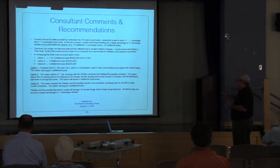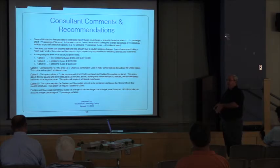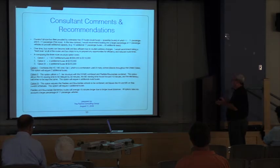That would be the perfect time to really try to take advantage of any of that we can. We talked a little bit before in comparing the three options. Option one is really 2 additional buses, at 55 to 110,000 from 1 to 2. For budgeting purposes, I think you want to say 2, potentially, because we're talking about doing routing 3 years from now. The exact number of students, the exact addresses, all of that detailed information you need to create bus routes, we don't have today. So just for planning and budgeting purposes, we should look at 2.